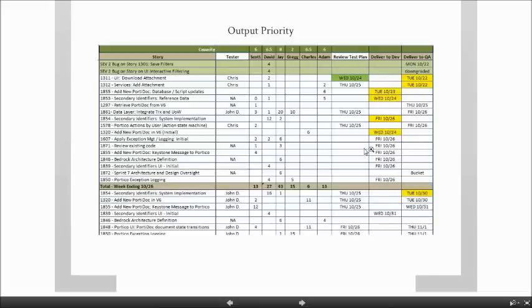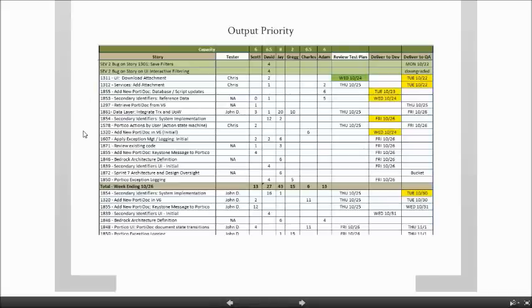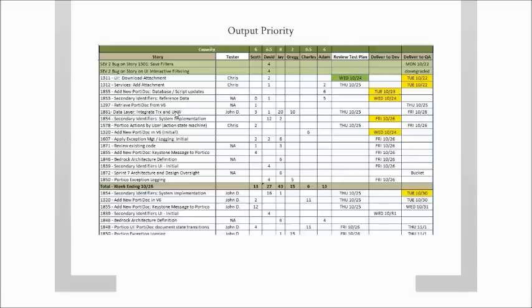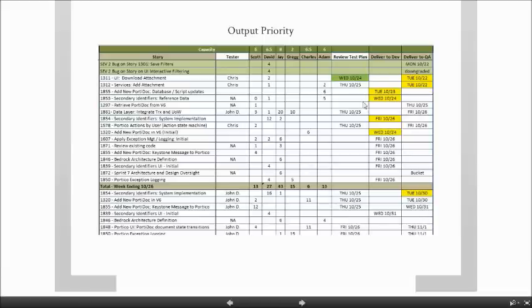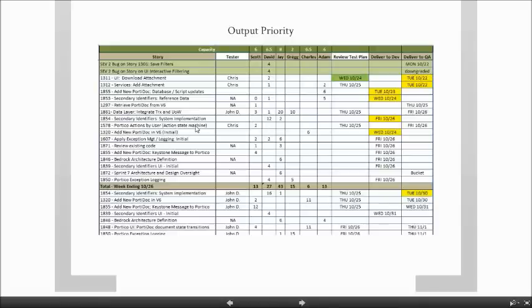Now these are dates within the 3-week period of time, so we're just dealing with very small chunks. We know exactly how much. We don't really have to spend time estimating how long this data layer integrate transactions and unit of work will take, per se, to understand how it's going to fit. All we have to really understand is, can we do it in the sprint? Because we know how long a sprint is. We know our time. We know our money. All we have to do is, can we fit it into the sprint?